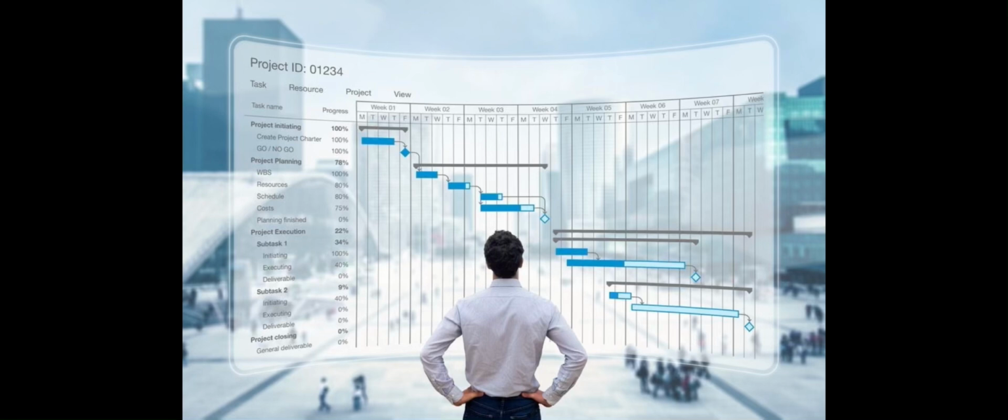And I love how the article emphasizes the importance of clear communication when it comes to the cost breakdown structure. Very important. You can't just present a bunch of numbers without explaining why certain costs are necessary. For example, if you have a significant budget allocation for specialized testing tools, you need to be able to articulate to stakeholders why those tools are crucial for ensuring the quality and reliability of the software. You're absolutely right. Having a well-documented cost breakdown structure with clear explanations and rationale behind each cost category makes it much easier to communicate effectively with stakeholders and justify those budget allocations.